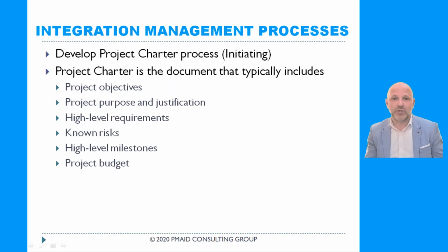state the intention to implement certain project. We present materials related to that project, all the materials that we know, and we receive the authorization to proceed with the project. And that's when we begin our planning. That's when the initiation ends and planning begins. The result of the initiating phase is the authorization to proceed with the project. So as one of project initiating processes, develop project charter process is the process that creates a document that serves the purpose of receiving the authorization to proceed.